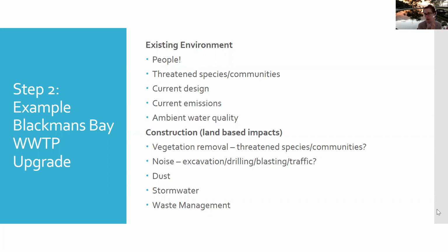We actually have a document on our website that says, proponents, if you want the best outcome, you need to engage with your community. You need to engage with those people who will be directly and potentially indirectly affected, to allay their concerns and do it early so that you manage it through the process and don't get to advertising and people scream loudly and unhappily. And I can tell you from experience that those that have engaged early and positively and supportively have had better outcomes than those who refuse to engage with their community.